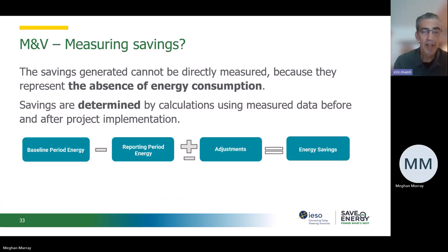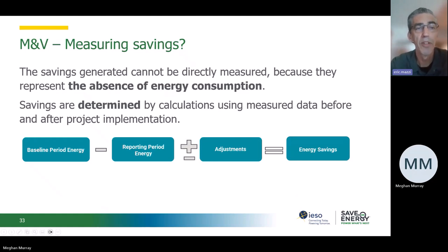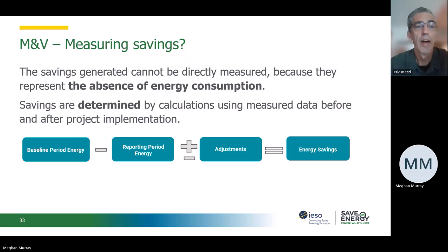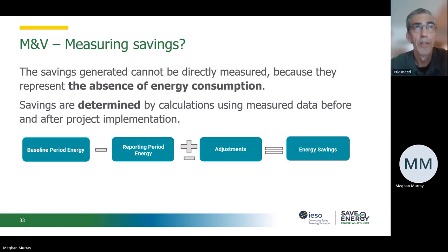Let's get into M&V methods and best practices. In principle, you can't measure energy savings — it's the absence of energy consumption. So savings are 'determined' — that's the language chosen in the IPMVP protocol. First, you quantify the baseline period energy, your post or reporting period energy, and very importantly, there's almost always the need to do adjustment because conditions change from baseline to reporting period, like outdoor air temperature.